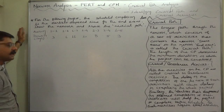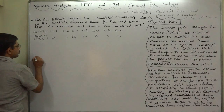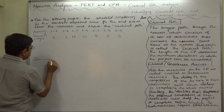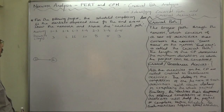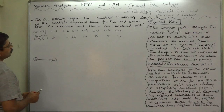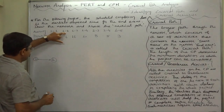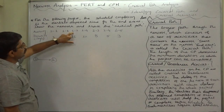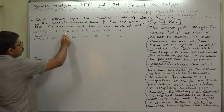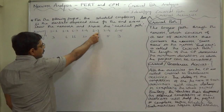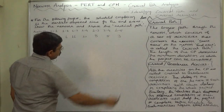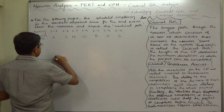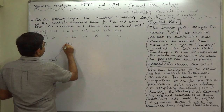Let's start drawing. The first is node 0, the start of the project, with only one initial activity between node 0 and 1. Now three different activities will start after completing the first activity: node 1 to 2, 1 to 3, and 1 to 4. Afterwards, we need to bridge node 2 and 3 by an activity, node 3 and 4 by an activity, and node 4 and 5 by an activity. So let's draw this diagram.